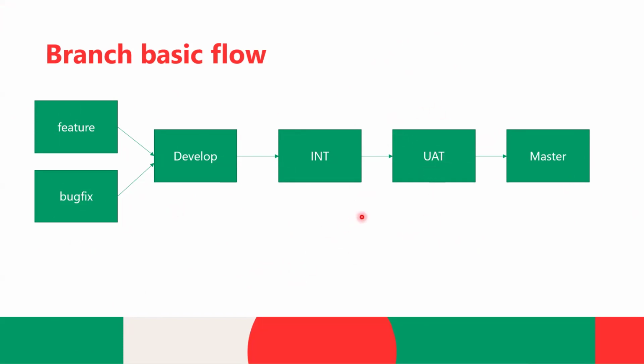If their timeline for UAT deployment is very frequent, then we cannot go with this approach, right? We cannot hold UAT deployment for 1 week. But if in some project they want UAT deployment to happen once in a week, in this scenario, without having a separate release branch, we can accommodate production, right? As I explained, the next sprint code will be deployed till INT, and we know there is a 1 week window, and for production we only need 2 or 3 days or 1 day also, right?